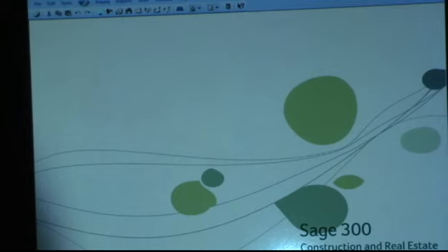For something like that, we'd probably need to create a custom field tied to the cost code. So that you could say, on this job, in this cost code, here's our burn rate. And then we could say, here's how many hours you estimated, here's how many you spent, here's how many you have left, and you've said what your burn rate is, I can tell you how many days you have left. Or however it is you're calculating that formula now, we can say what are the pieces of information that go into it, and make sure they're in the system.